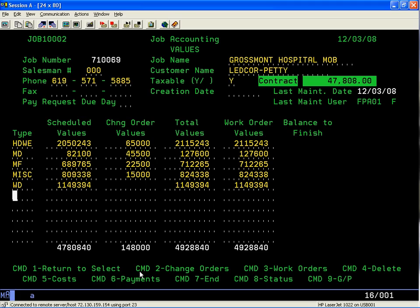We have schedule of values on the left, the change order values, the total values, your work order values, and your balance left to finish. The schedule values—your original contract values—come out to $47,808.